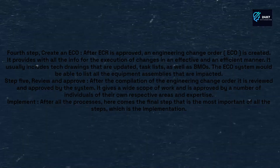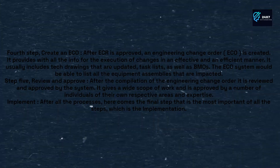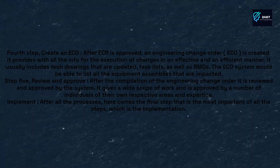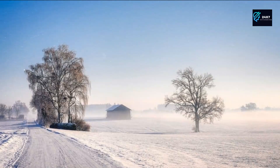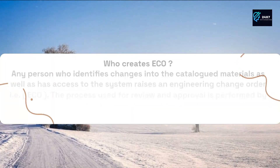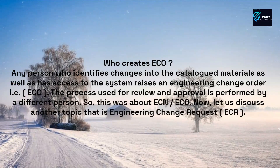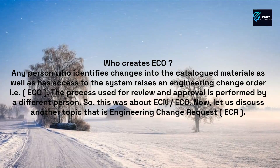After all the processes, here comes the final step — implementation — which is the most important of all the steps. As for who creates the ECO: any person who identifies changes in the cataloged materials and has access to the system raises an Engineering Change Order. The process used for review and approval is performed by a different person.